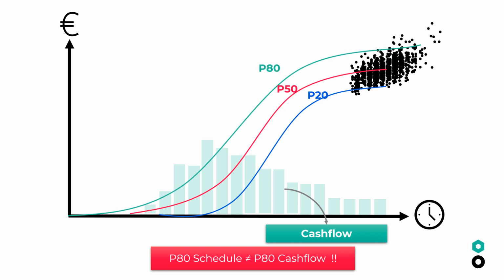Say that John at the start of the project has 40% available of the agreed budget. At what time will he need additional funds to be 80% confident that he will not have a negative cash flow? For this, we need to understand that we are looking for simulations that give the earliest date where the initial available budget is exceeded. The probabilistic cash flow curve allows us to answer that question based on the P80 cost curve.